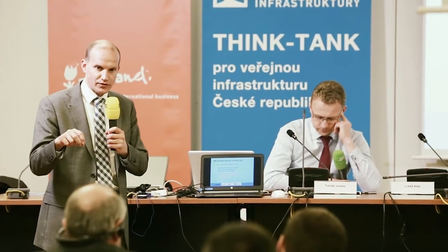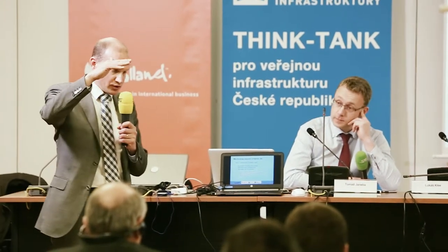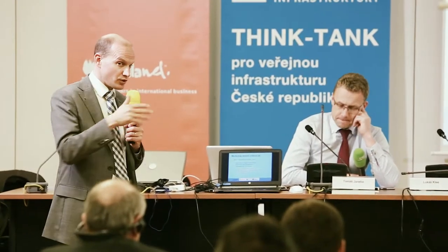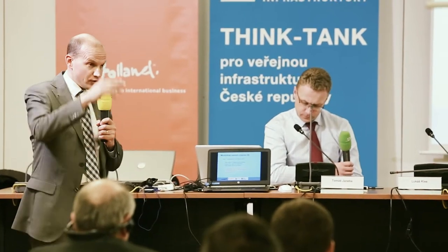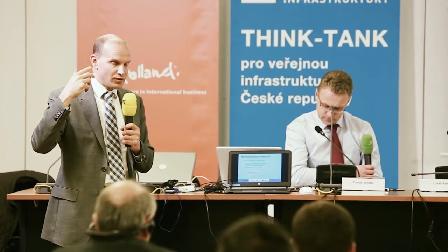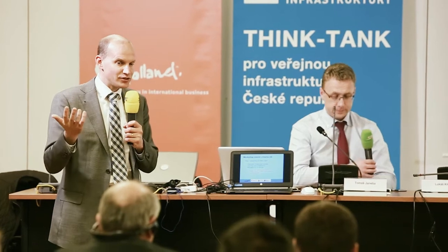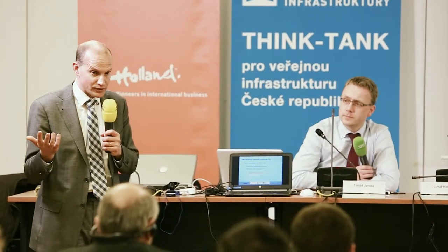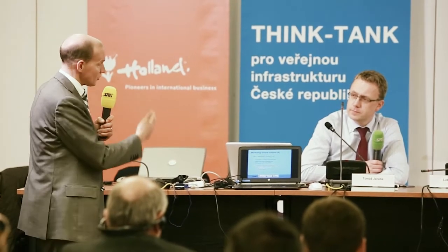What we've seen in the Netherlands is that when you go MEAT-based award, the number of contractors goes down because they start to think whether they can win this project or not. Do they have the expertise and the skills to differentiate themselves from their competitors? So I think that's also a very positive point of going to MEAT.